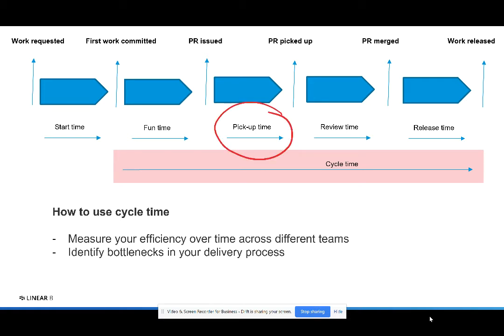For example, if one team has a pickup time higher than others, you know you need to dig in on the importance of the review process with them and potentially even look at their workload as a team. Another example is if your release time is trending higher over time, you know it may be time to invest in continuous delivery and continuous deployment.